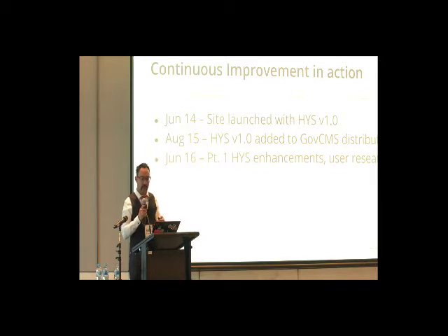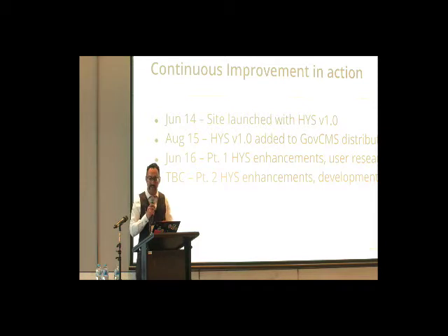So at the end of phase one, we had a backlog ready to go, with all the detailed, or high-level details at least, to be able to work out an effort for the amount of work it was going to take. We had worked out it's roughly two sprints. As I mentioned earlier, we had already worked out how much a sprint would work. So now we had basically a mini project ready to go when we were ready. But the thing was, we haven't had a chance since then to actually work on this. There are too many other priorities and other resources that are competing for this.